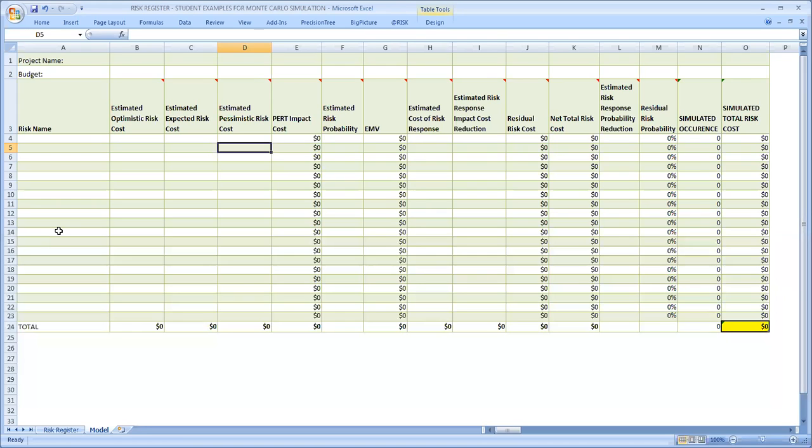Because as we know, in project risk management, mitigating risk can take the form of mitigating probability or impact, or even doing both at the same time. So I'm going to walk you through this simple model that uses a PERT estimate, because that is one of the most common forms of distributions in a basic project risk management model.